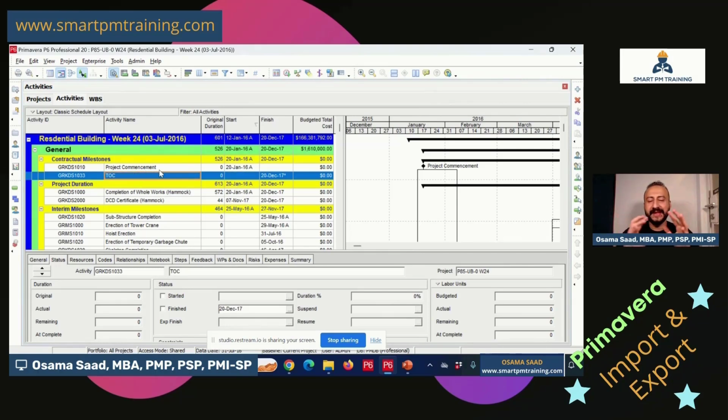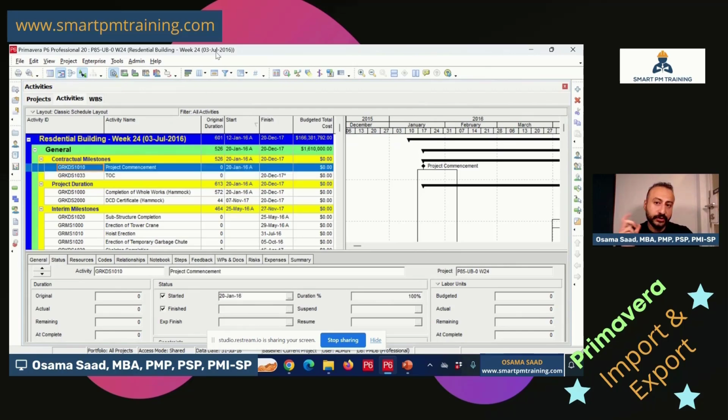But I have already the schedule update of 31st of July. So why did I do all of that, right? It's because you import the actuals. This process is called the bifurcation. It's an industry term, scheduling term. So that's what I'm gonna do. I wanna split the actual progress from the logic changes. I imported the actuals, but I kept the logic of 3rd of July.